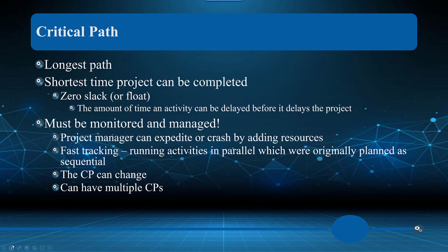So at key points, when we do what's called a risk management assessment, if there's high risk for a task, we can add in some buffers. And if we need those buffers, we then have them in our project. We have them in maybe our PERT chart, and we can utilize them. But if that ends up not coming to fruition, that we actually incurred that risk, then we're ready to move on with the project without those buffers.